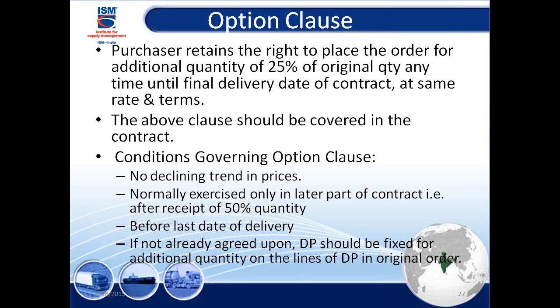So we say, guys, if you want to make amendments, then do it after 50% delivery has been done. So that way you keep in mind, not take the right the other way around. So it has to be done before the last date of this contract.